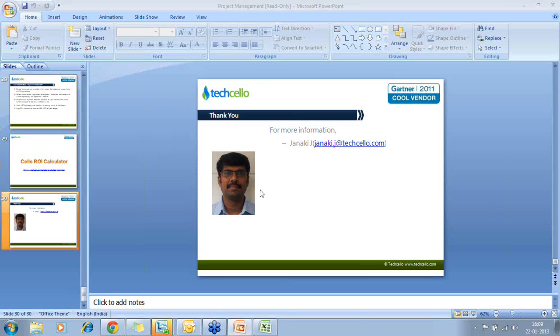Okay, we have some more questions. There is a question from Riju C. How can we create our own framework? Yes, like we saw, the entire list of what a framework constitutes is there. We just showed you, and it's also available to download. What does it take? It takes the amount of effort that we just saw. It takes the availability of senior technical people, and then you should be able to do it yourself. When all the items are selected, we saw it took almost 153 person-months of effort. So if you could afford an effort of that size, you would be able to build your own framework.